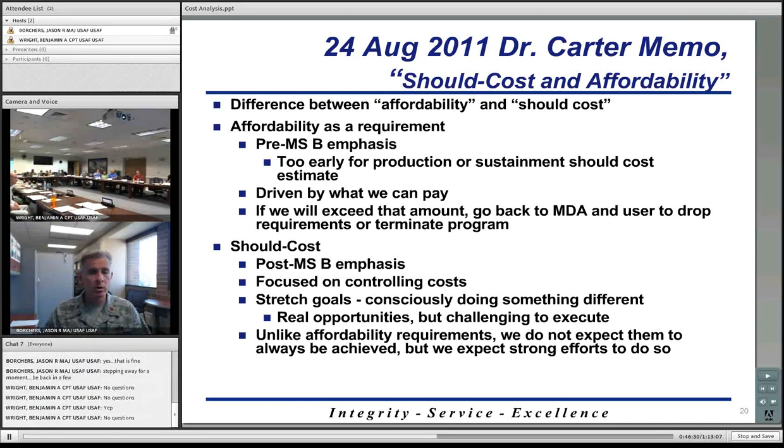Now, what you would do, this would tie into some type of disposal costs, or I think it's a contingency fund, if you will. How much contingency reserve or management reserve or whatever it's called, the amount that you would have to pay the contractor should your program cancel. You're going to owe a certain amount to a contractor, so you do need to factor that amount into your new cost estimate.